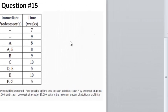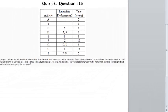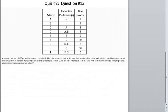So class, this is question number 15. I'm going to go over it again. It's a question about crashing. When you get a crashing problem and you get a table, the first thing you have to do is determine the critical path of the problem — that's where you're going to do the crashing. The critical path might be more than one. First, you draw the diagram, so let's draw the diagram first.